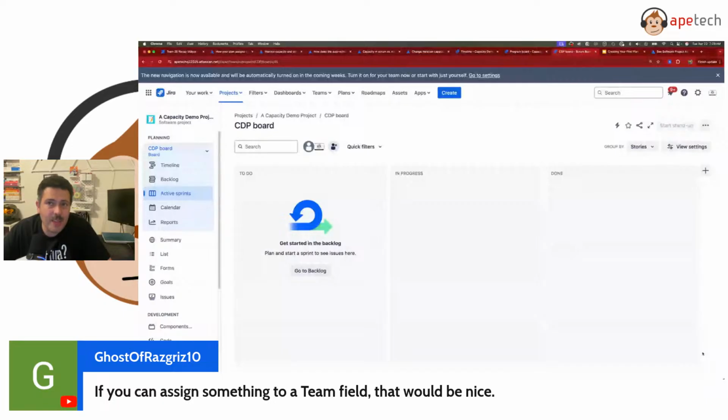And I think I find value in a team field. I just don't find value in Atlassian's team field, mainly because of the scars that I have from the errors or mistakes that have been made. But I am a huge proponent of creating some sort of a team field, whether it's a default one or making a custom one, where you do assign a big thing like an epic to a team. And then that team will then decompose that epic down to the stories that are done by the individual contributor. So I am a fan of that.